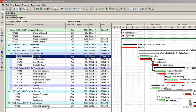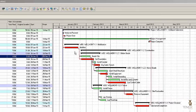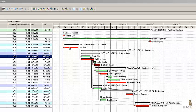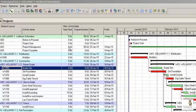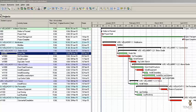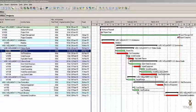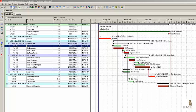Here we have a schedule and on the left we have listed all the activities in that schedule. On the Gantt chart you can see the relationship between activities. We have scheduled this project so we know what the critical path is. The critical path is all activities that have zero total float. I have also listed in the activities view the column total float, which displays the total float of each activity. This lets us see in the total float column or on the Gantt chart all activities that have zero total float and could cause a delay in your project if not performed exactly according to the schedule.